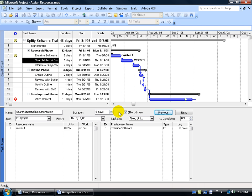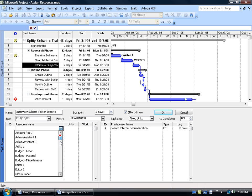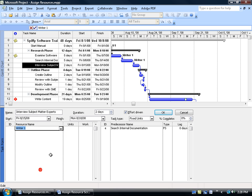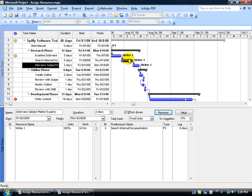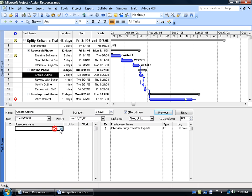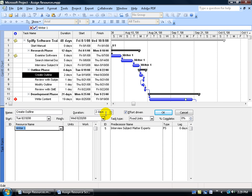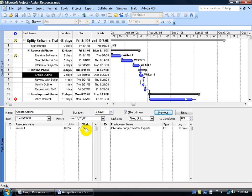Now, if we would just want to stick with our Detail pane down below our Resource view, we can go ahead and click Next and notice it jumps from Task 4 down to Task 5. You can see Task 5 is listed here. And let's do Writer 1 again. Click on the drop-down arrow. Select Writer 1. And go ahead and click OK. And you can see over here in the Gantt chart that it's easy to spot our resources here next to each bar. Let's go to Task 7 and also assign Writer 1. Duration is 2 days from August 19th to the 20th. Click OK. And he's working 16 hours at 100%, 8 hours a day.